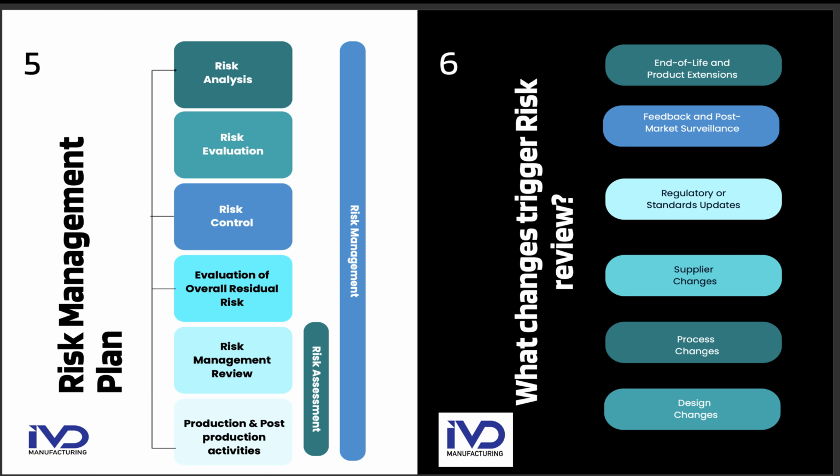Risk evaluation is mainly done in terms of the RPN, which is called the risk priority number, which comprises occurrence, severity, and detectability as the 3 parameters to arrive at a concise figure of values. Once we do the risk evaluation, we need to move to the third stage, which is called risk control. We need to define a procedure by which we can bring down the RPN score to an acceptable score as per the defined standard operating procedures.